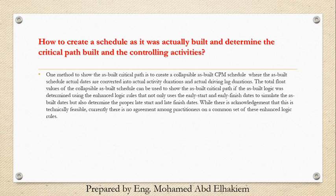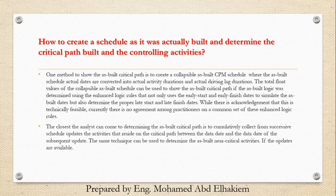The closest the analyst can come to determining the as-built critical path is to cumulatively collect from successive schedule updates the activities that reside on the critical path between the data date and the data date of the subsequent update. The same technique can be used to determine the as-built near-critical activities if the updates are available.